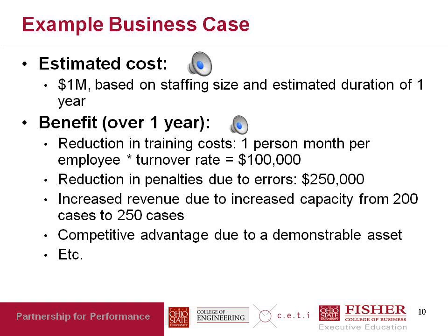Assume additional time from the potential users of the system to collect requirements and so on. Throw in equipment costs. You'll need a development environment. You'll need a test environment. You'll need a deployment environment. You'll need software licenses and things like that. And you can come up with an estimate, and we came up with an estimated cost, once again primarily based on staffing size and the estimated duration of 1 year, of about $1 million.